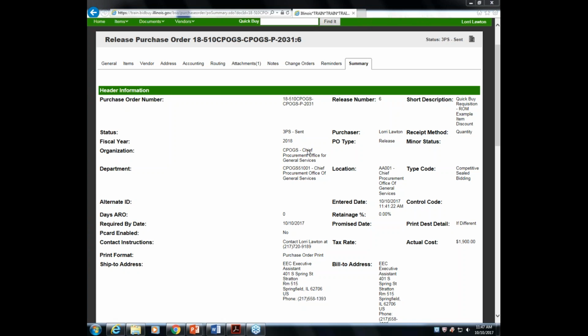And that is the point where you would contact the vendor help desk and say, I need to put this quote in. My vendor says they don't want to register, that they don't have the time. Can you put it in? Can you register the vendor, please? And then at that point, the vendor administrator will create a vendor record for that user, so that you can then put their quote in to build the procurement file in BidBuy.